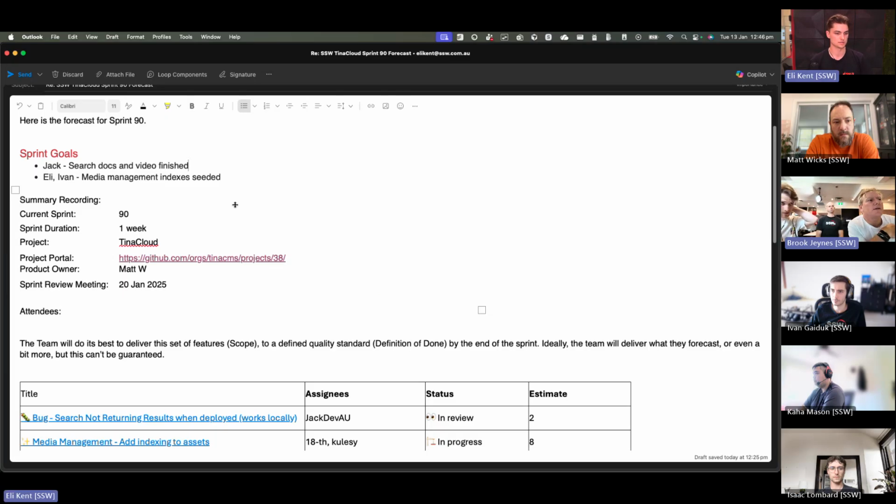Yeah, so the work that needs to be done to resolve that is to add in the branching for media management. And for that to go in, we need the media management indexes. Okay, so can you put in brackets a prerequisite for the nasty error messages that are popping up?